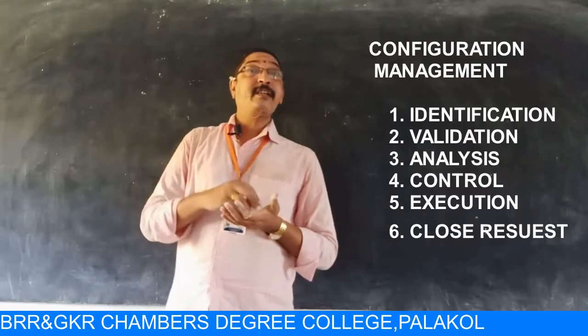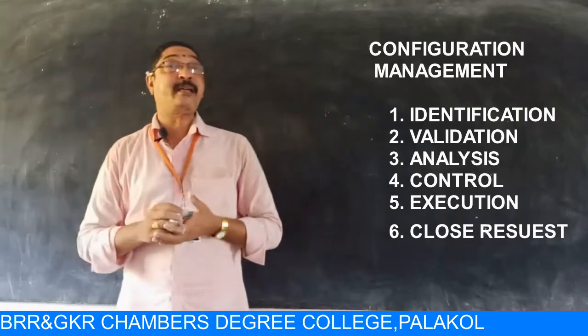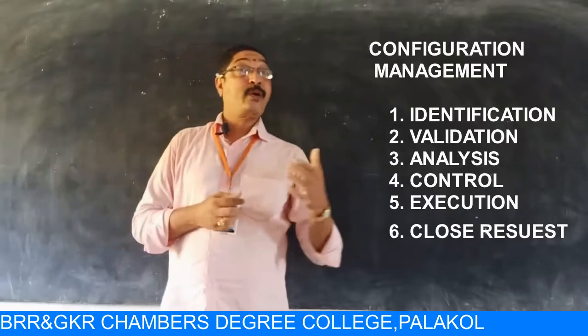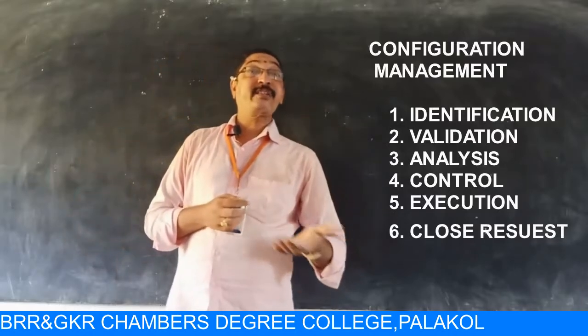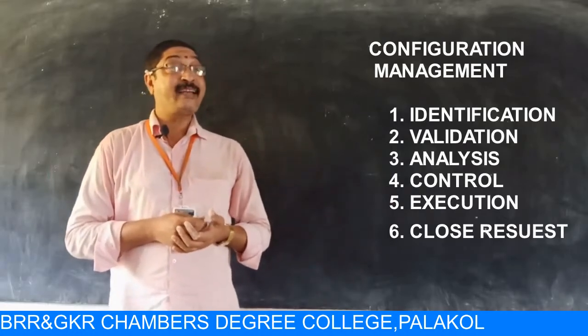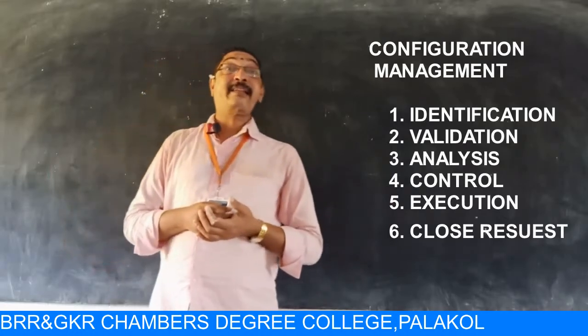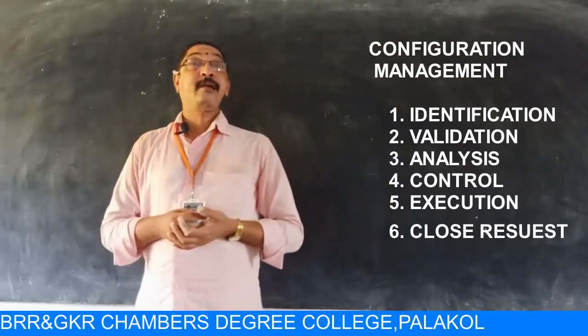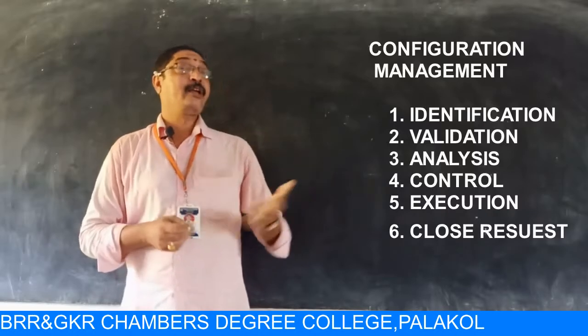All these must be intimated to top level management, and they have to get approval from the management whether to change the requirement or not. The top level management will again check, analyze, and take a decision to accept or reject. This will be handled in this control phase.